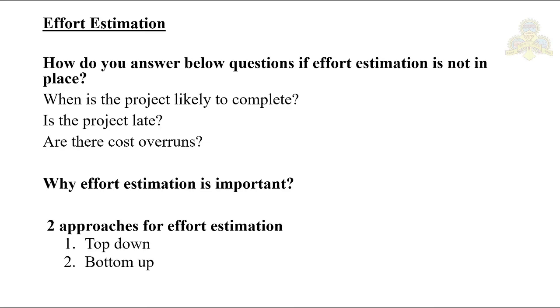For a software development project, your overall effort and schedule estimates are essential. These are the prerequisites for planning your project. These estimates are needed before the development is initiated, as they establish the cost and schedule goals of the project. Without these cost and schedule goals, you cannot answer questions such as whether you have completed the project, whether your project is late, or whether there are any cost overruns. You cannot answer these questions. So effort estimation is to be in place.